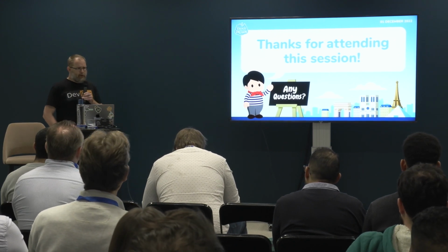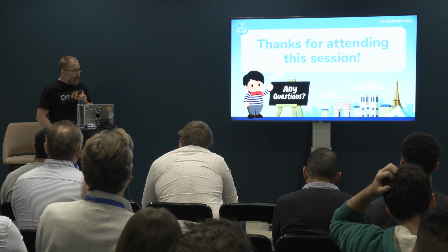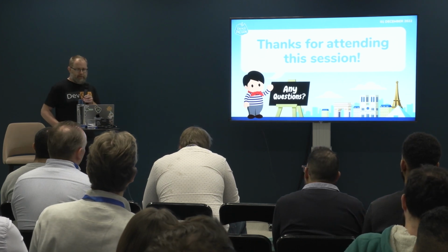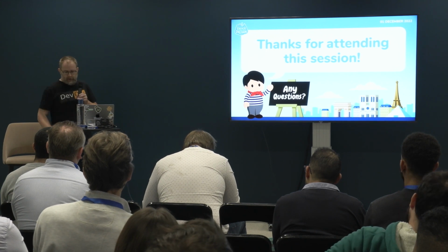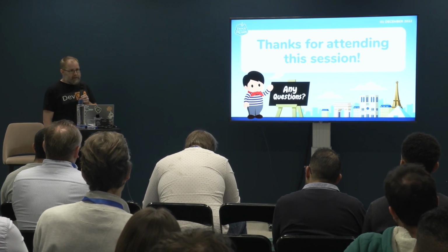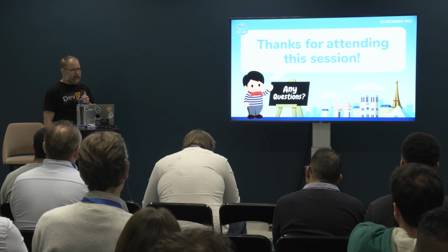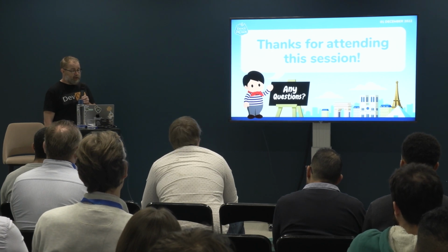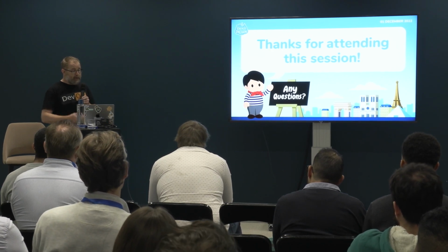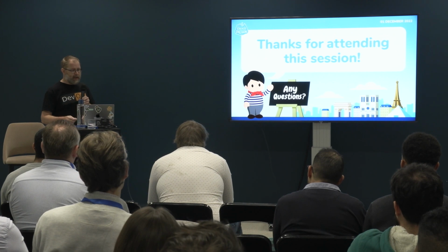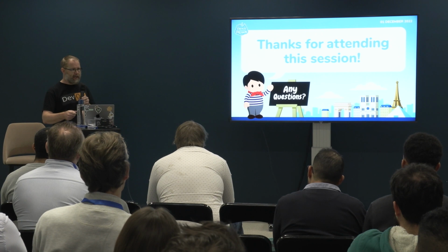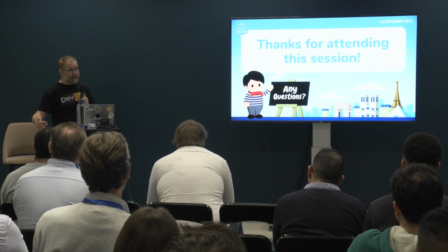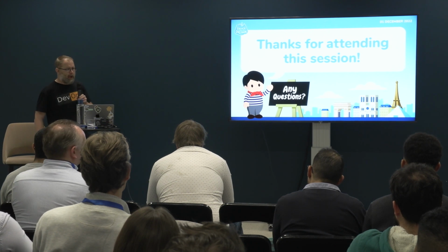Yeah, so the question was around merge conflicts between those different branches where they actually start getting out of sync with each other. There's a few ways that can happen. One is potentially your branches are too long-lived. Okay, so the pace of change means that it's been so long since I've refreshed this branch or merged it back in, that actually a lot has changed in that time. If you're a very active team, that can happen.